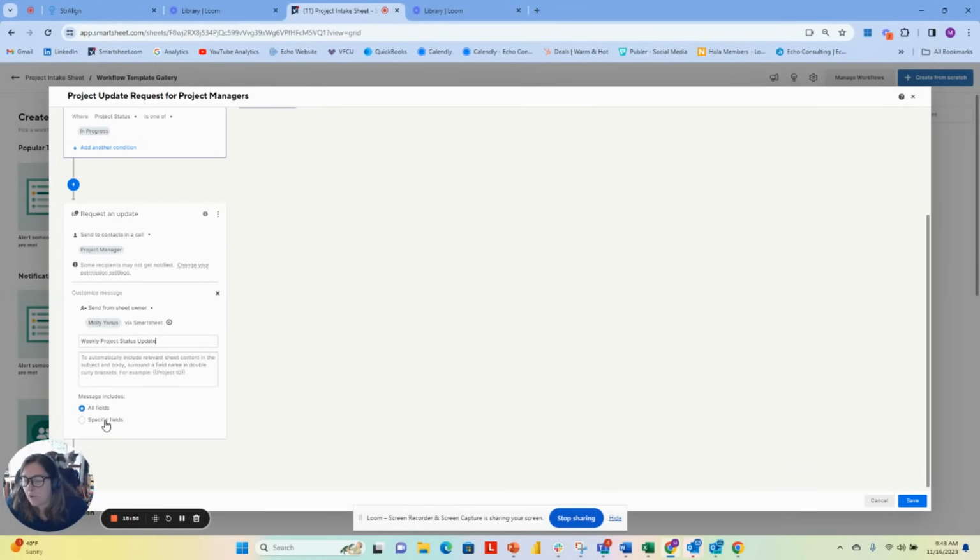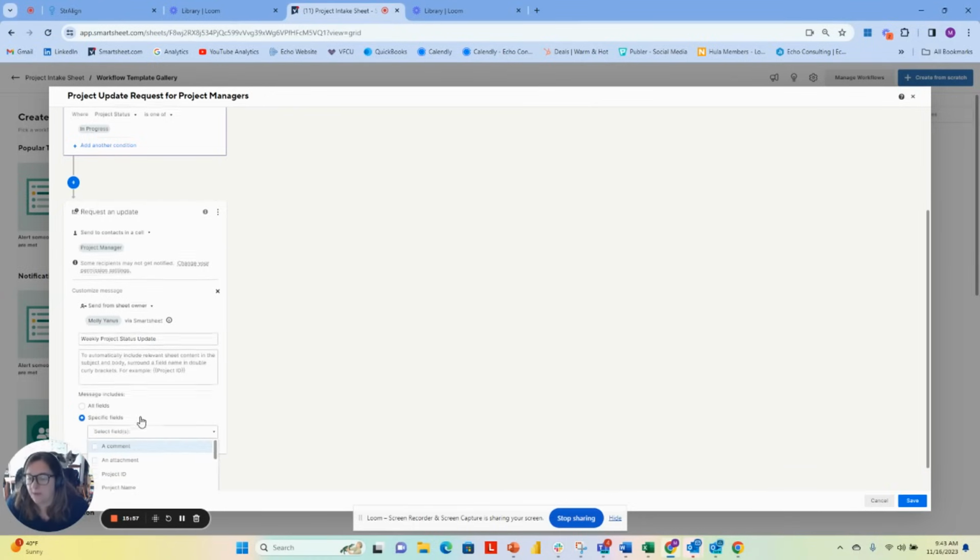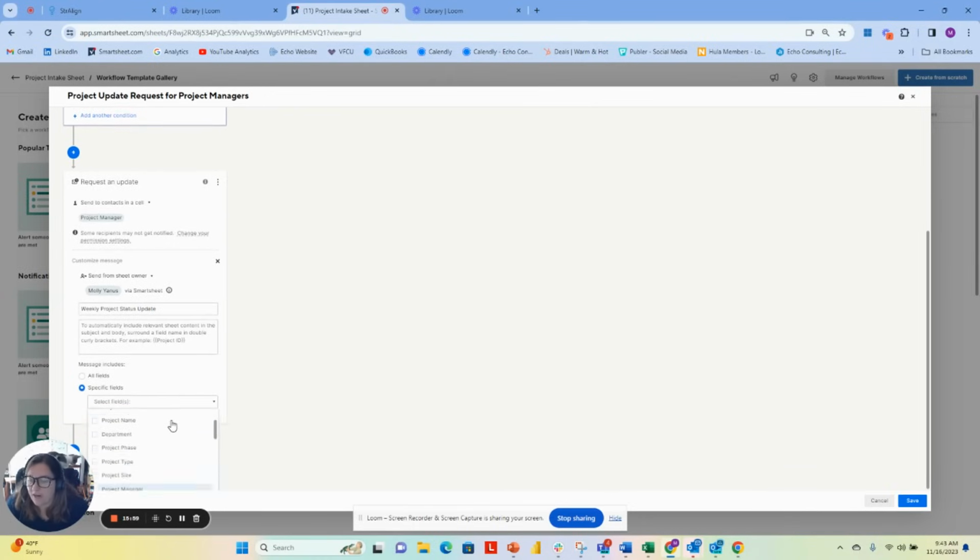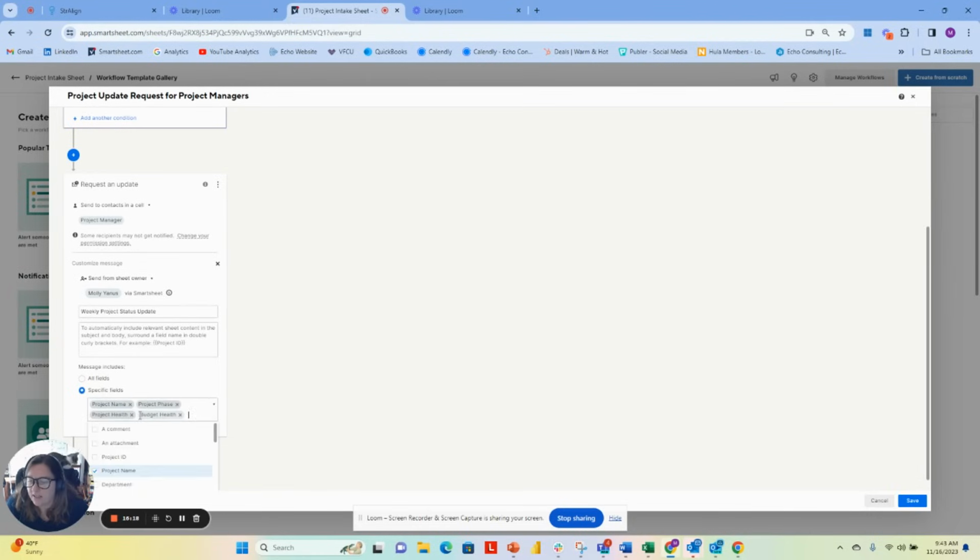And I'm going to have specific fields that I want them to update, right? So I don't want them to update the project name, but I'm going to have the project name as a reference for them. And then I might want them to update the project phase. The start and end dates are actually being linked in, but I'm definitely going to want them to update the project health, the budget health, the schedule at risk, some of these other columns, and project status and things like that.